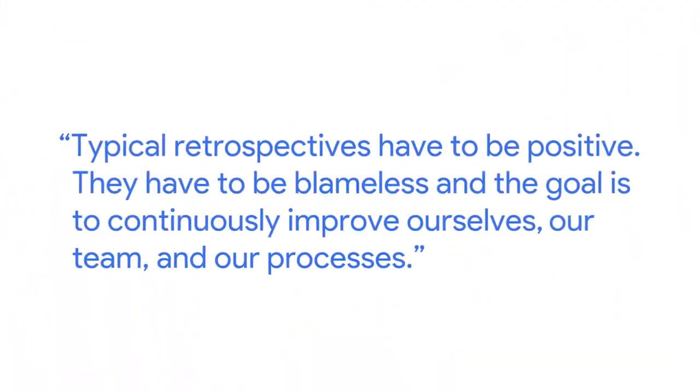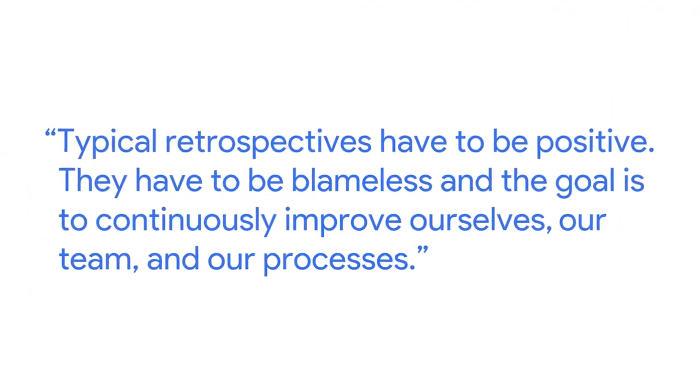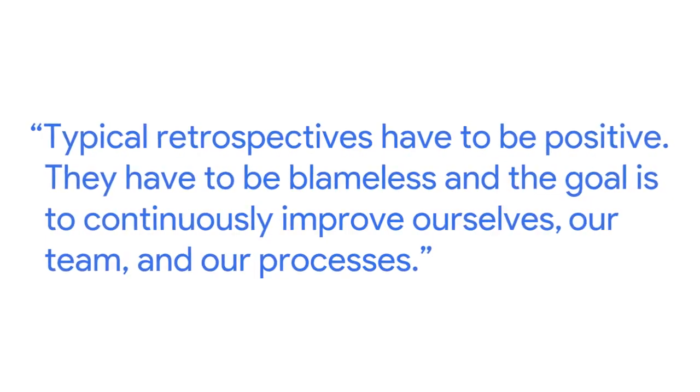Most commonly, we do retrospectives at the end of projects, but sometimes if we're in the middle of a project and we find ourselves needing to make decisions, we would collect a lot of the data that we would collect for an end of project retrospective and do that in the middle of the project. Typical retrospectives have to be positive. They have to be blameless. And the goal is to continuously improve ourselves, our team, and our processes.